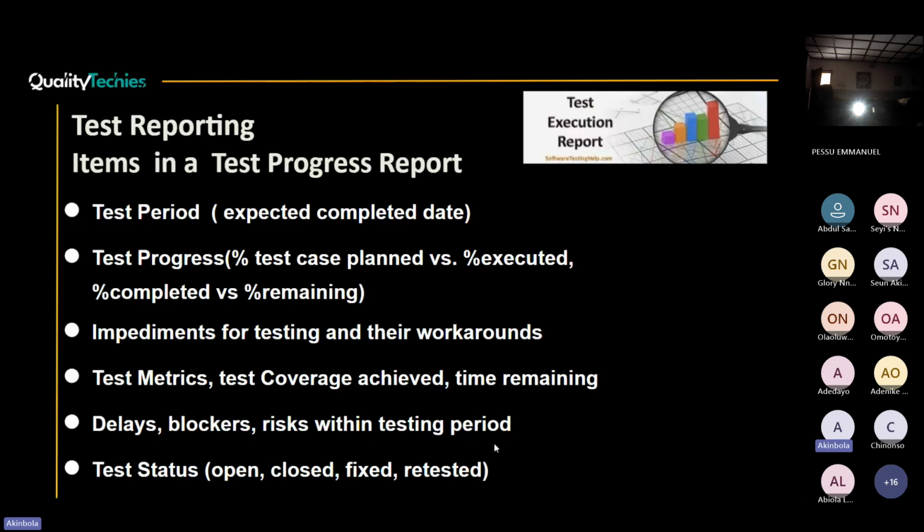In your test plan also, the test case plan, what is it called? The test case is that test plan, right? So you are going to give us the percentage of what you planned and what you have executed, and also the standing for each day. Then what is actually blocking you from testing the other ones? Are there any major blockers? Is there something that you need to escalate to us at that time so that it will not impede? So you also expect to put that in.